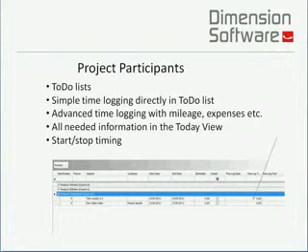So when you do a recalculation of your critical path and your slack in your project, this information will be taken into account. So your critical path may change based on this information.